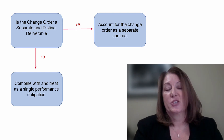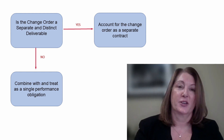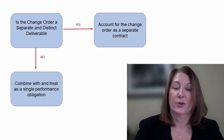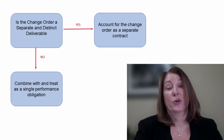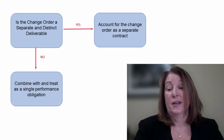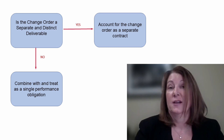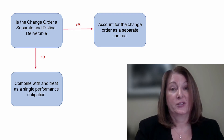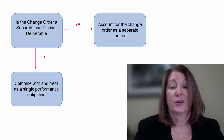If these conditions are not met, the change order is considered a part of the original contract and the original performance obligation — you will record it and include it with your original contract. Under ASC 606, change orders are accounted for as variable consideration.